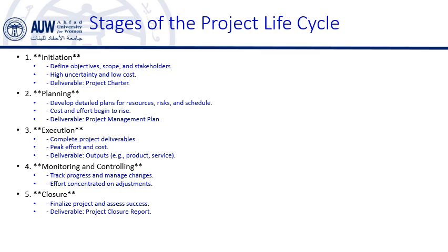Any deviations from the plan, whether in scope, schedule, or cost, are identified and corrected according to a correction or prevention plan. In this stage, the deliverables are performance reports, including updated schedules, resource allocation reports, and risk assessments.